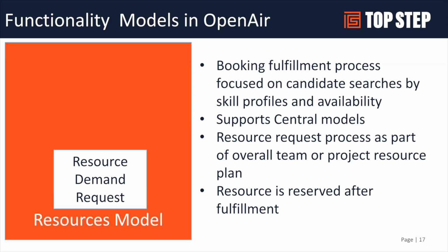It also requires you to have and manage skill profiles in the system because it really focuses on availability based on skill profile elements in the system. It is really designed for a central model. An example of where I've seen this be really powerful: I had a customer that implemented computer systems in large office buildings. For go-lives, they would need 20 folks over a weekend to sit at the terminals and support the go-live.